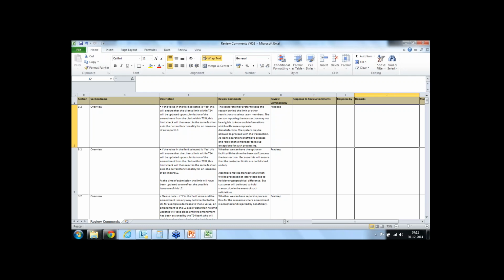That dependency factor is your customer, and the other dependency factor will be your internal staff, your billing counter, and your support staff. Because when you delay your activity, you may cause delay of customers, thereby impacting the billing, and the support staff may be impacted because they may not get sufficient time to arrange the logistics. So this is a kind of dependency in a project. Every project will have dependencies, and we will have assignments to identify such dependencies.